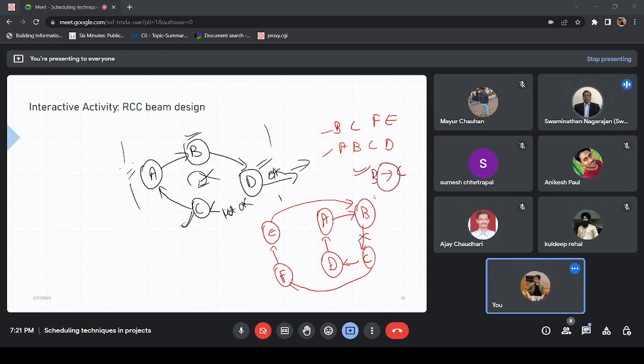Yes, sir. But we do the tearing only so that we can solve it like any other CPM problem, right? To calculate the duration, etc. Yeah, just for that duration calculation, we will discuss in the next session. But we do the tearing only for that, keeping in mind, right? Yeah, we don't want to get lost in the cycle again and again.